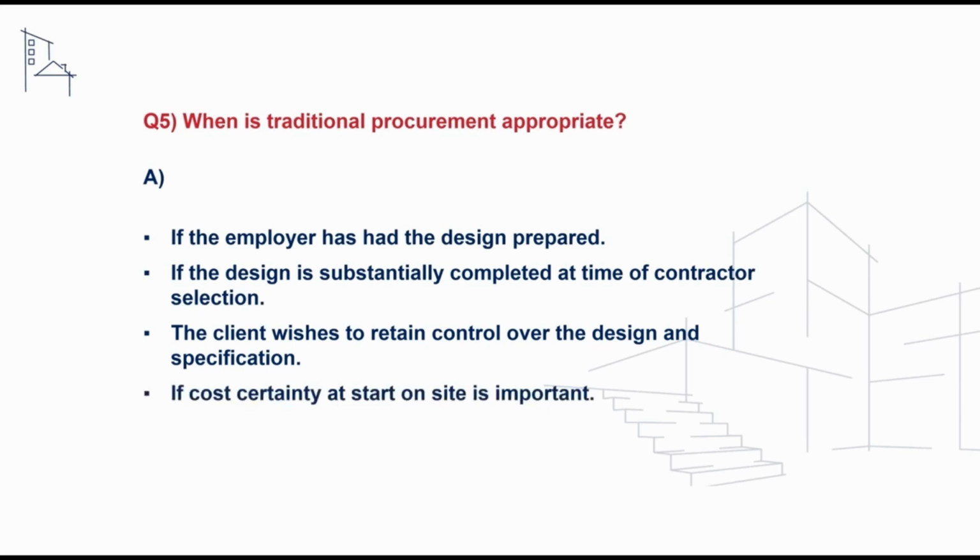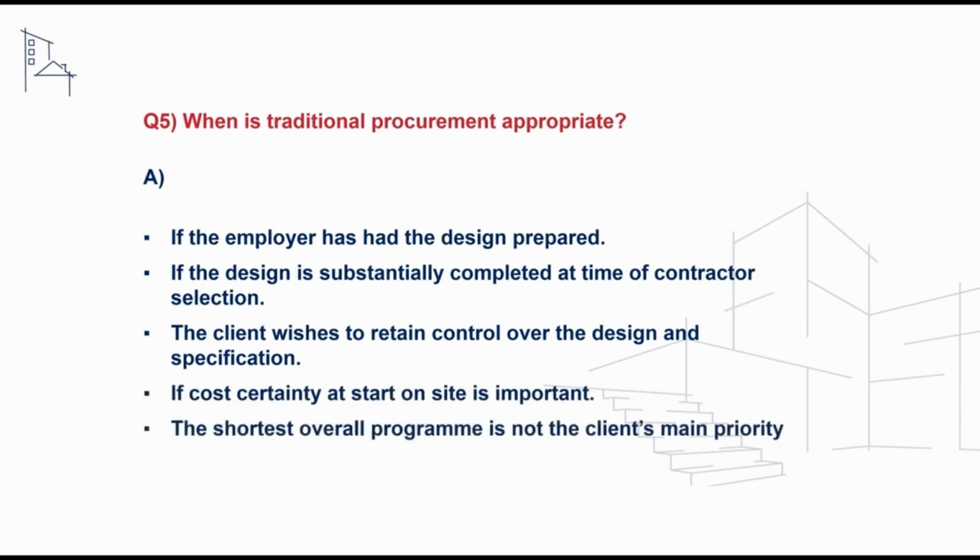Another factor we may need to consider is that the shortest overall program duration is not the client's main priority due to a lack of overlap between the design and construction. Traditional procurement relies on the design being largely complete, so there is minimum overlap between design and construction phases, which will result in a longer program.